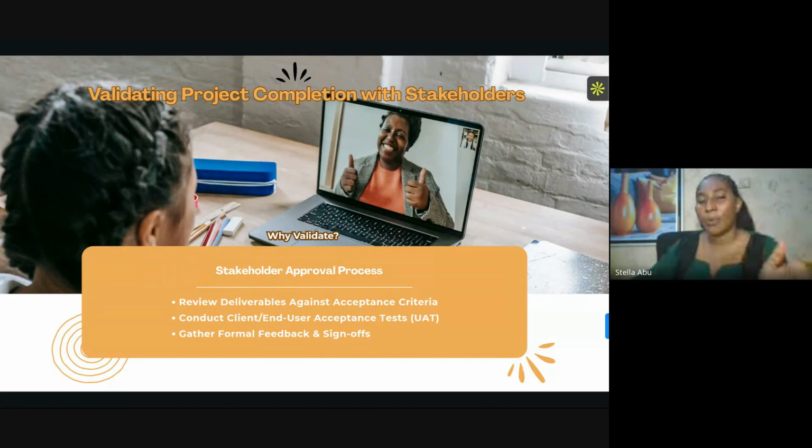Because what am I doing? I am reviewing your deliverable against your acceptance criteria. I'm not just coming to say, okay, let me see what you've done. Okay, this is what you've done. Okay, it looks fine. This looks fine. Okay, this is looking fine.